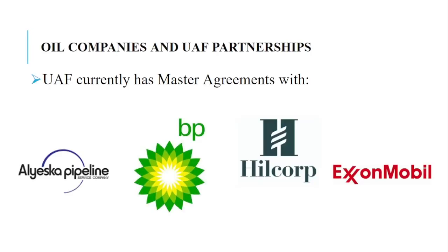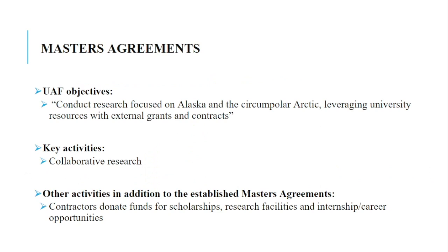The oil industry partnerships at UAF today are with the Alaska Pipeline Service, BP Exploration Alaska, Hilcorp Alaska LLC, and ExxonMobil Global Services Company. Because of the frequency of research contracts, UAF and oil companies use master agreements, which have prearranged terms for contracts that only require new project proposals to have a statement of work, period of performance, and a budget. The objective for UAF is to conduct research focused on Alaska and the circumpolar Arctic, leveraging university resources with external grants and contracts.